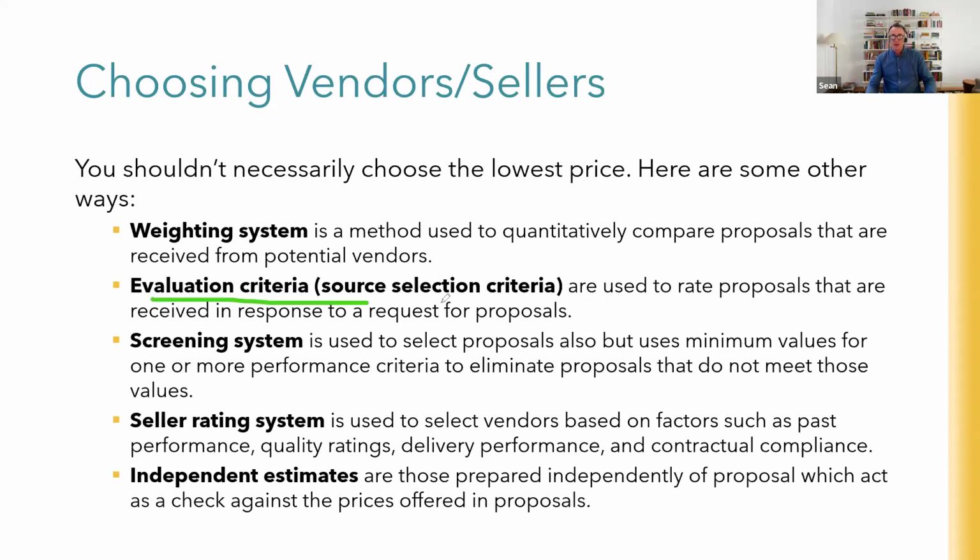You'll have some evaluation criteria yourself, that source selection criteria, which we've already talked about. And it could be that we'll only accept responses from people who have 5 years experience, or we want to be able to see your financial books, or we want to be able to see the CVs of the staff, or we want to see this many references we can talk to. You'll have all of that.